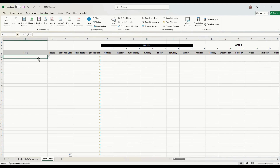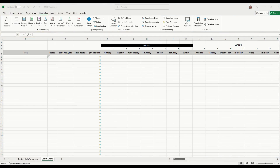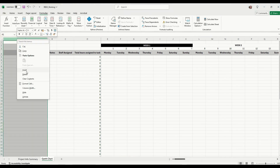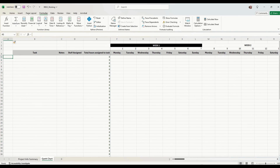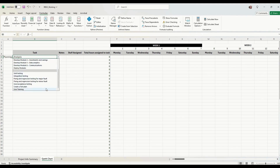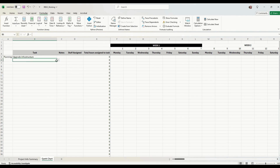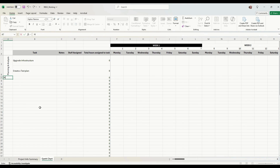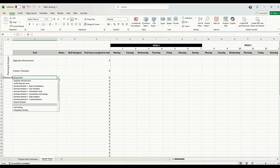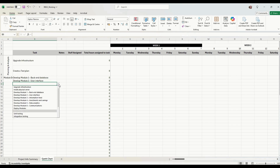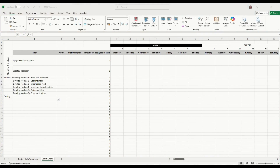Now we need to start populating this with tasks. We're going to follow the traditional Software Development Life Cycle: first we have planning and analysis, then development of all the modules, then testing, then deployment, and user training at the end. We insert another column and start with our planning and analysis tasks — that's going to include upgrading the infrastructure, which has to be done first, and creating the test plans, which we'll need later.